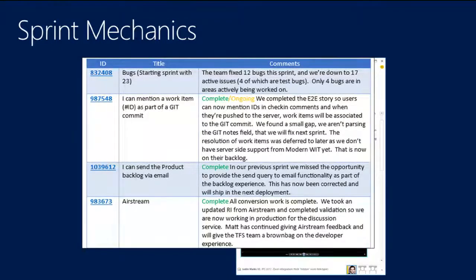So what the team will do is they'll put a new story on the backlog. They'll take that remaining work and make sure it's parented to that story. And they might work on that in the next sprint. But stuff's going to happen, and you're not always going to get everything done. And so you've got to have a strategy internally for how you're going to deal with that. If you want to talk about some of my thoughts on that, feel free to come talk to me at the booth afterwards, and I can share. I don't think there's a perfect answer for every situation here.